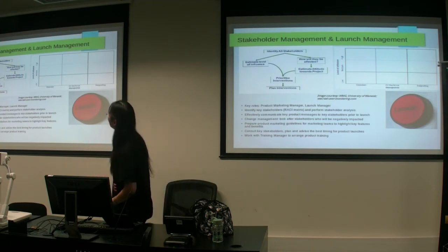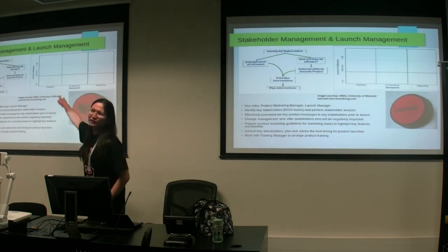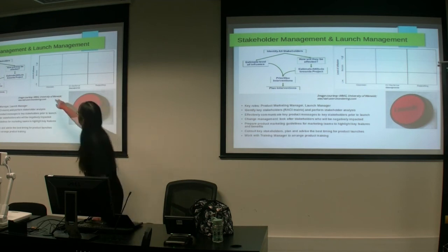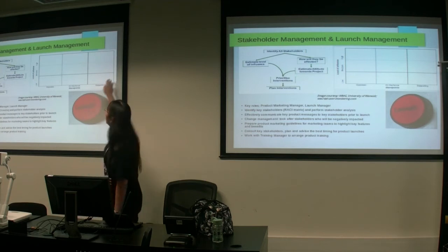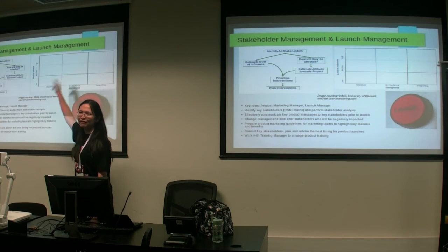So when they launch a product, they should do a very thorough stakeholder analysis. Put all stakeholders into a matrix, such as whether they are likely to be opposing, supporting, or on the fence, and their level of influence.